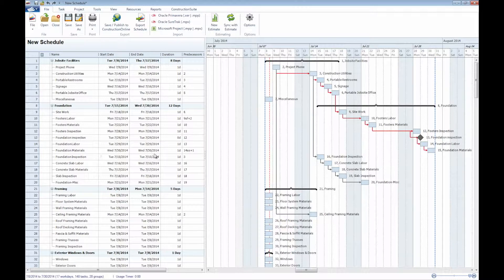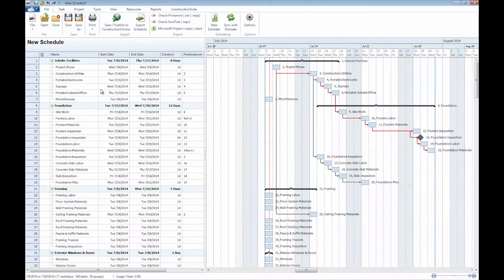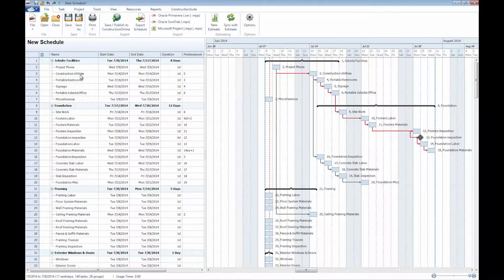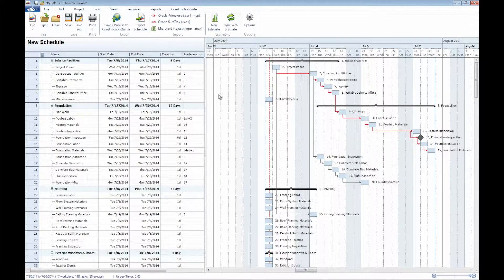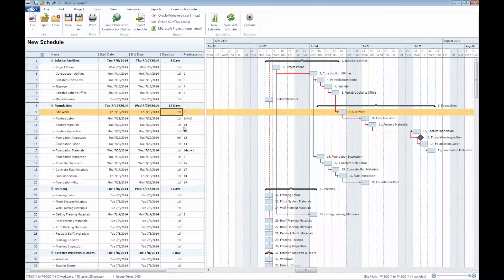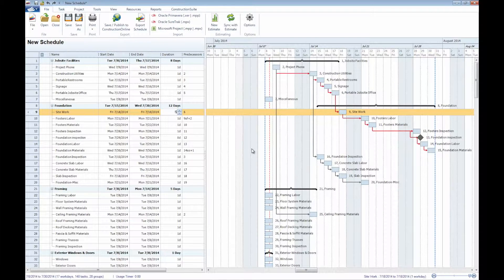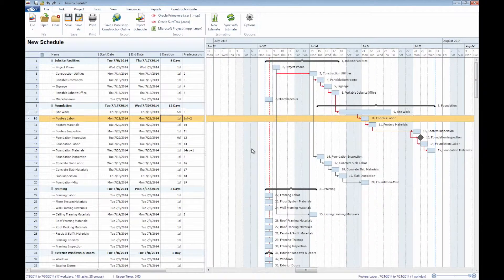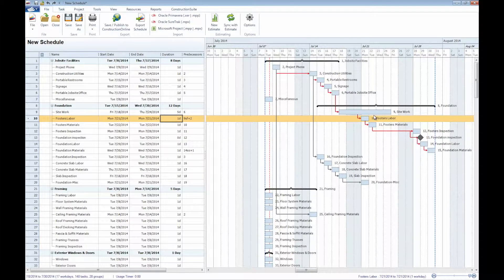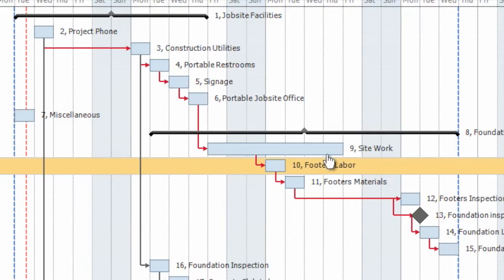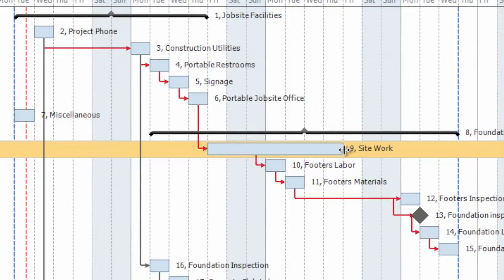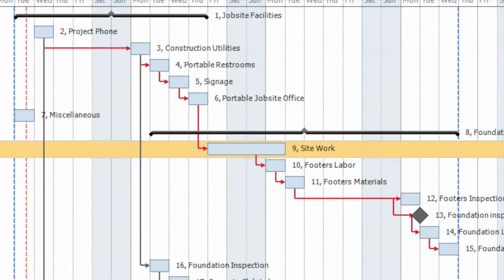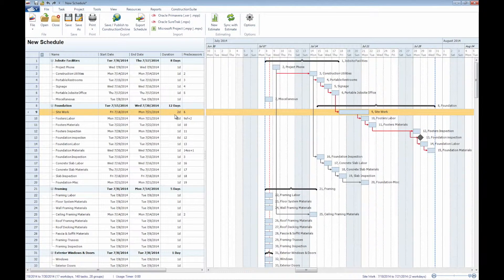We'll see here on the left-hand side, we have our task list, and on the right, we have our Gantt chart. Modifications to these individual groups or tasks can either be made directly here within the task list or can be made within the Gantt chart as well. If we knew that our site work here was going to take a total of five days as opposed to one day, we could put in five to signify five days, and we'll see that change has been modified here as well. In the same time, we could also select this task, put our cursor over the edge of the task box there, and then click and drag it accordingly. We'll see that now the days have been updated here within the task list as well as the Gantt chart.